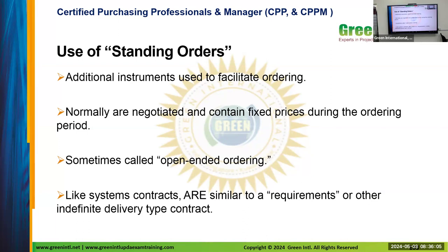For example, gold, you can see the prices of gold every day, what's going on in the market is going to remain the same all over the world. Similarly, such index, if available, the supplier will say, okay, whatever the market index is, plus 20% of my profit, I will make the pricing. So that kind of a clause has to be mentioned.